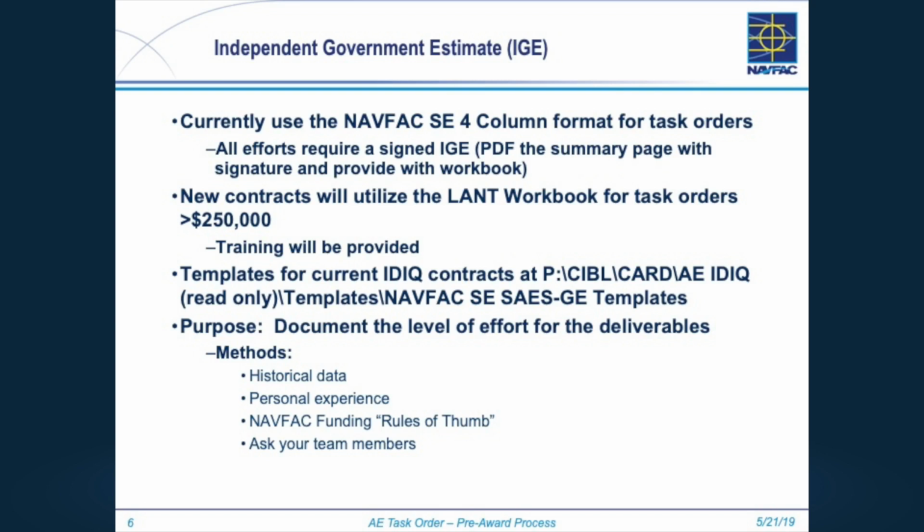That's a starting place. If you've done it before or you've bought it before, site survey and geotech comes to mind. We buy that all the time. We probably have some historical data. You can use that as the basis for your estimate.